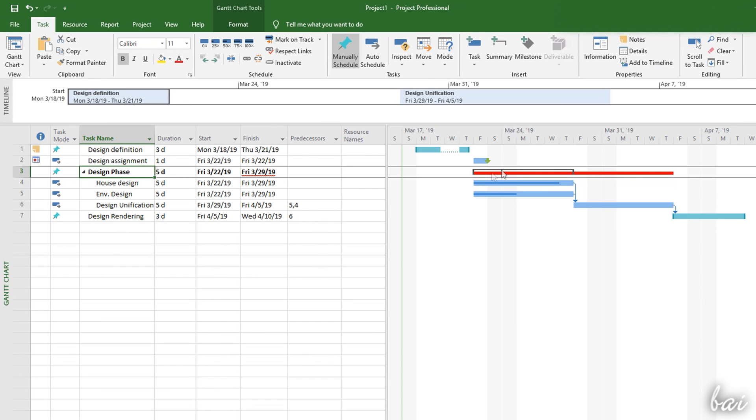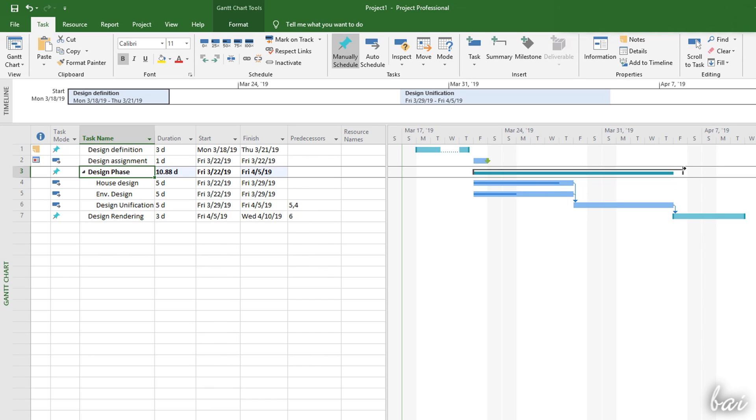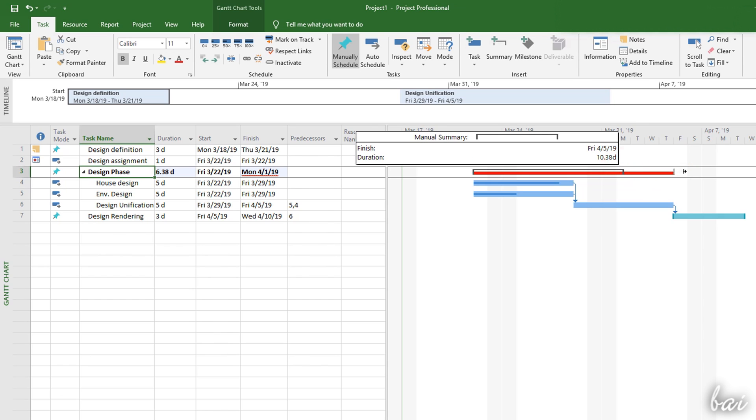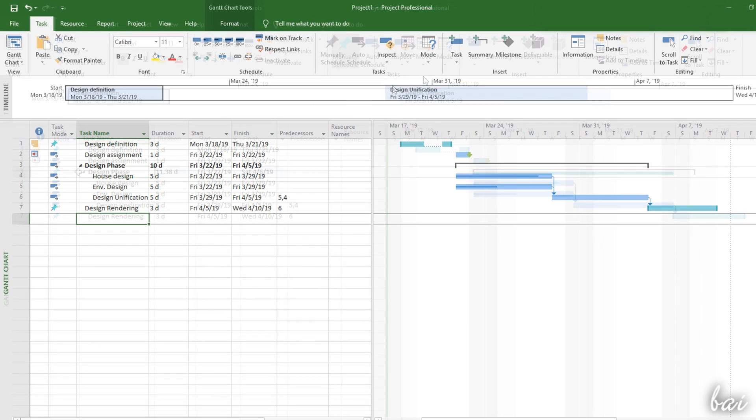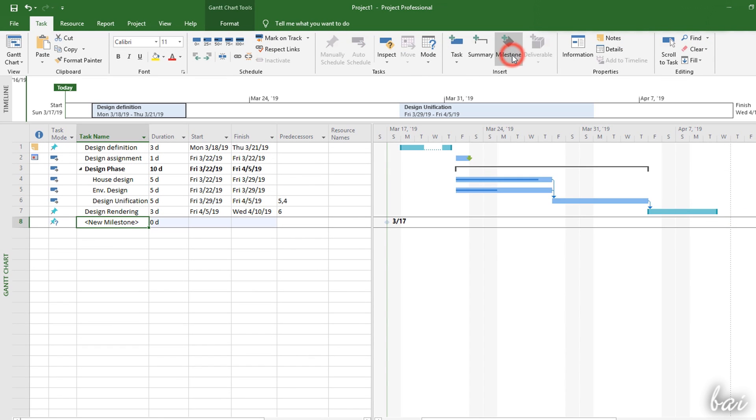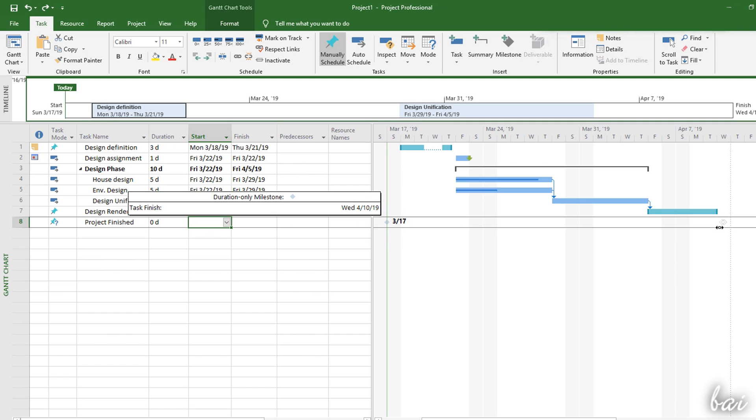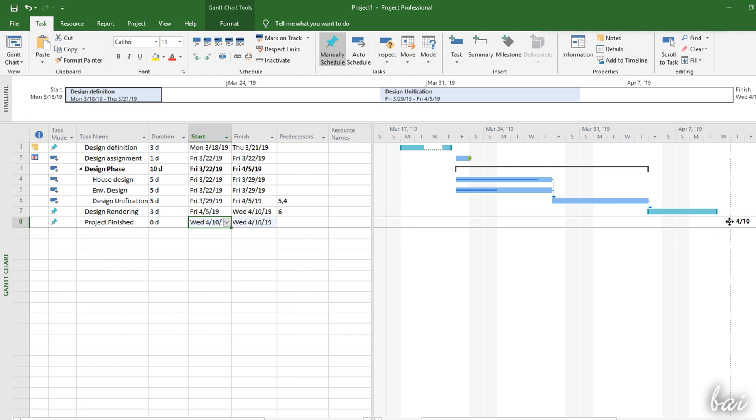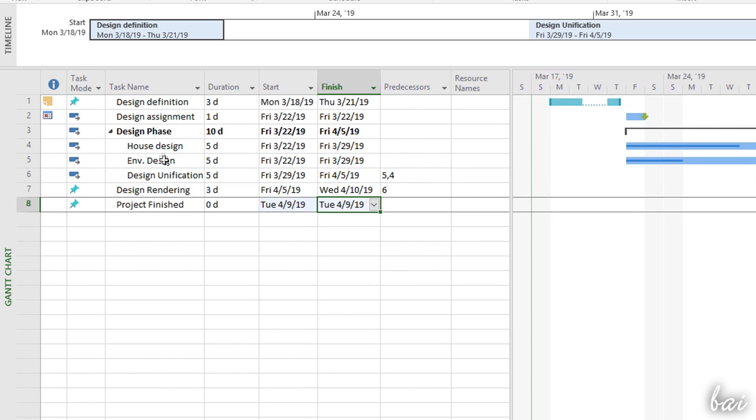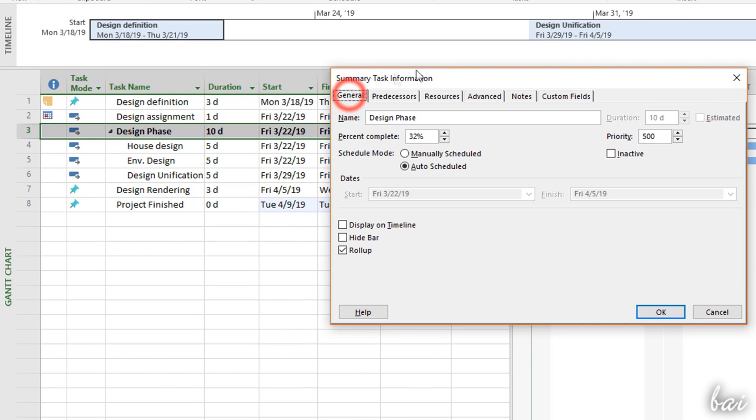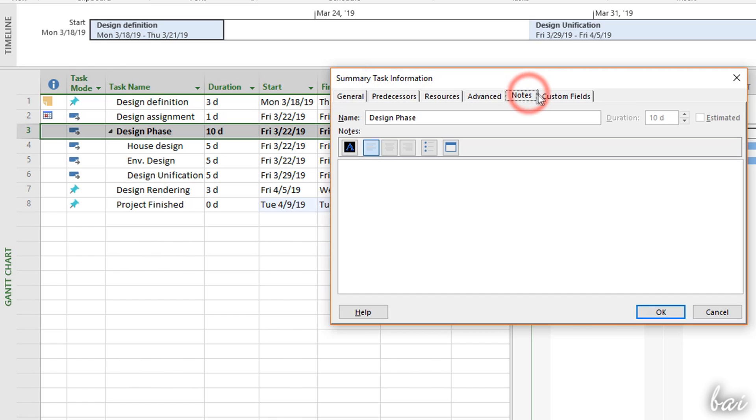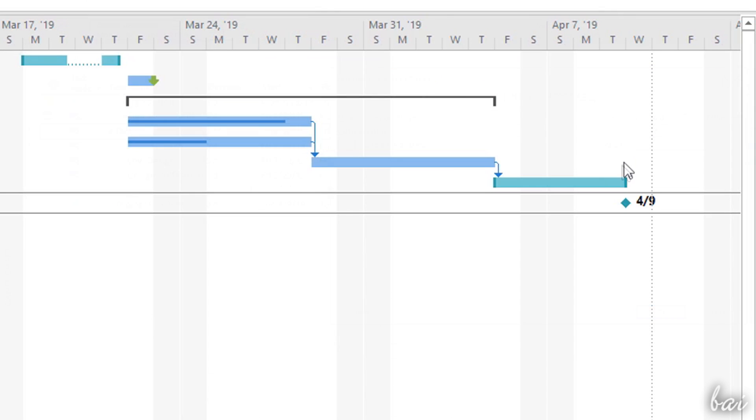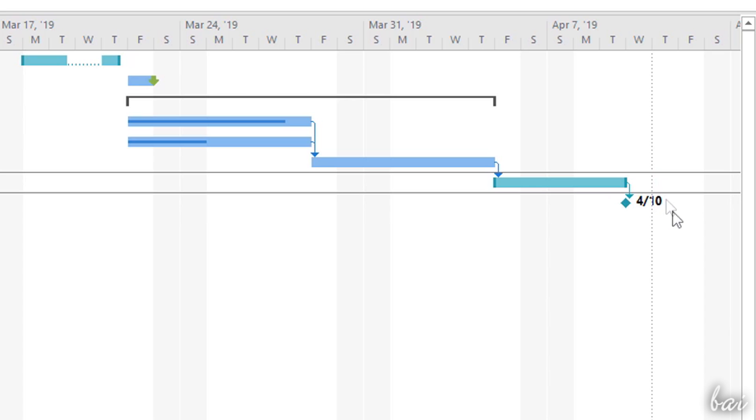On the Gantt chart, summaries are shown as thick containers extended in time as much as their tasks inside are, but you can still adjust their duration in case it is a manually scheduled summary. Milestones are markers representing reached goals on the timeline. These are shown on the chart as single points complete with the goal date in bold. Summaries and Milestones properties can be adjusted by double-clicking on these and using the Information panel. These objects can also include links, just like the standard tasks.